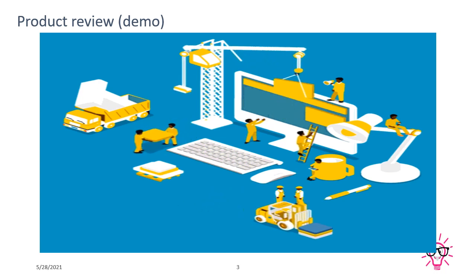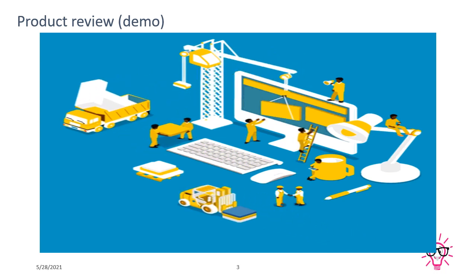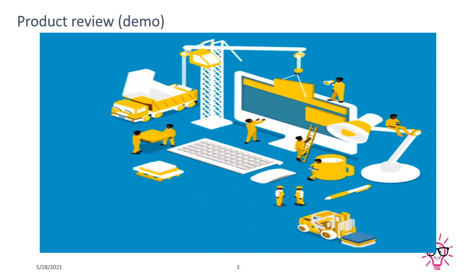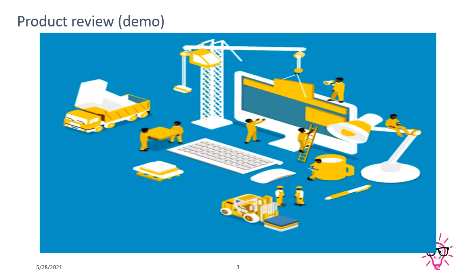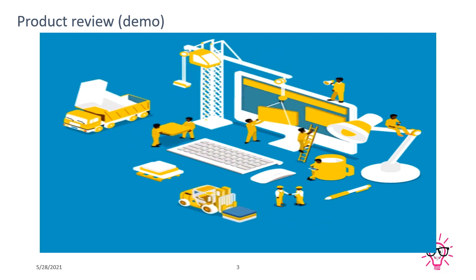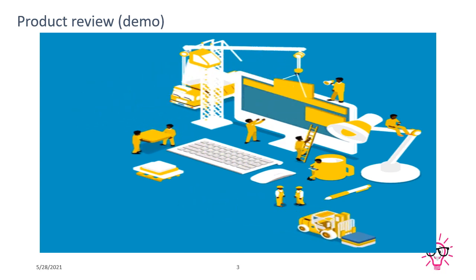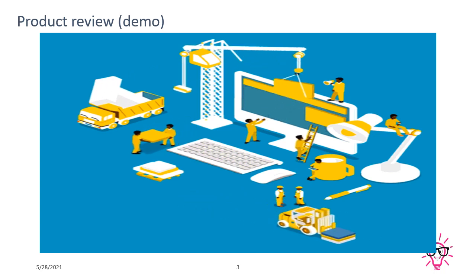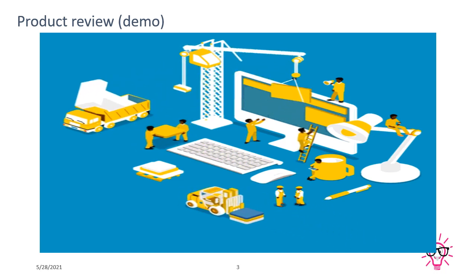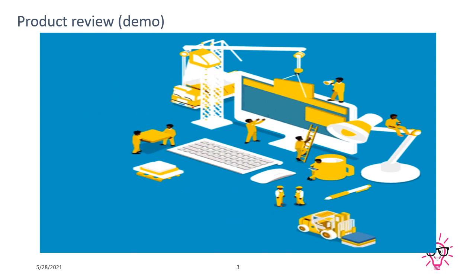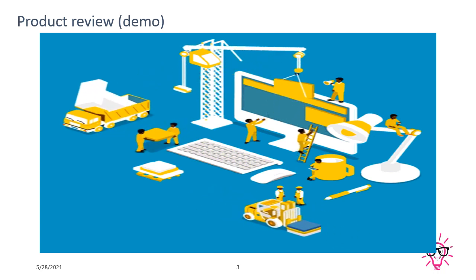If the client says no, there are some mistakes or a few things which still remain that we can't see in this demo, and if the team didn't work on those areas previously, then just gather those requirements in the same demo, act on all of them immediately in your next sprint, whatever the client says, and push your next sprint's requirements after that.